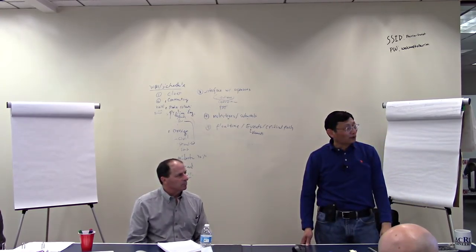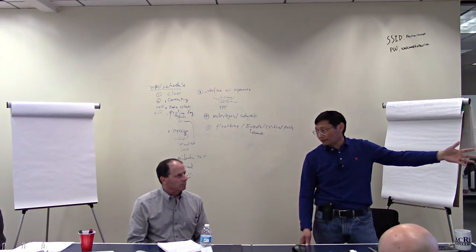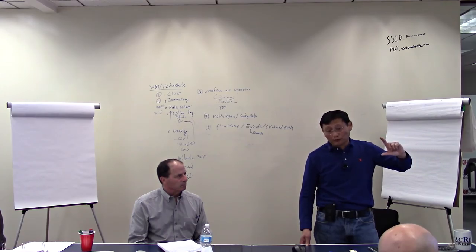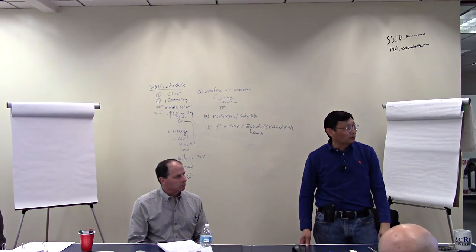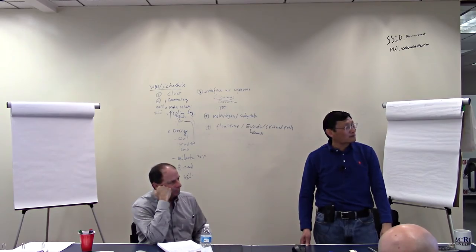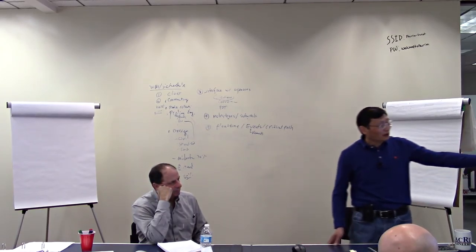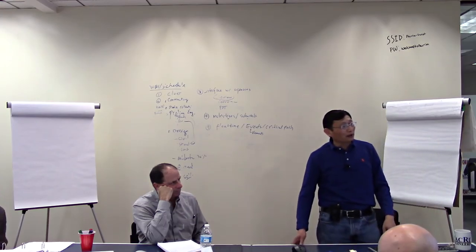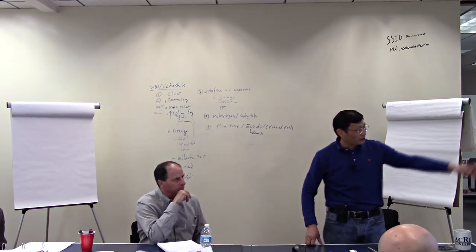They require the SBE reporting within the monthly report as well, so that the information is tracked and reported. That's what we're talking about, project report. Most of us are doing that right now. So we document this here. They ask to report per task. Some projects will just report per project, and this one gets a little more detail. For each task, what's the status for this month, and what is anticipated for next month.